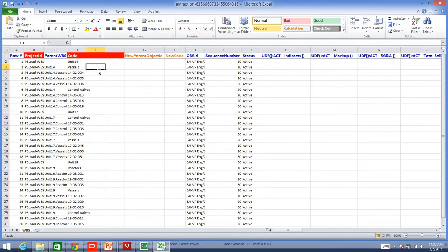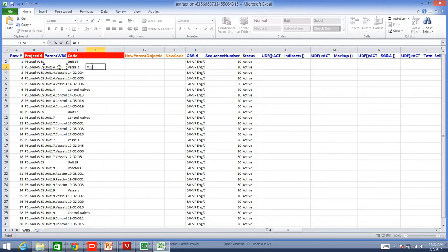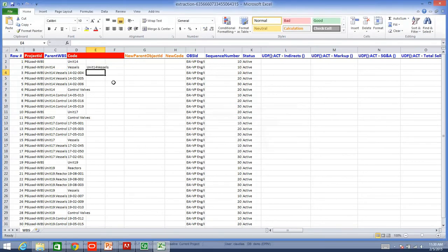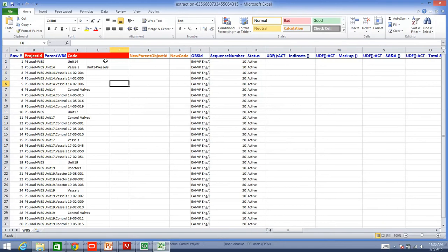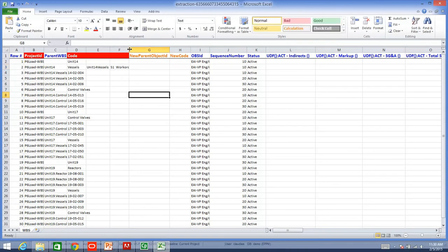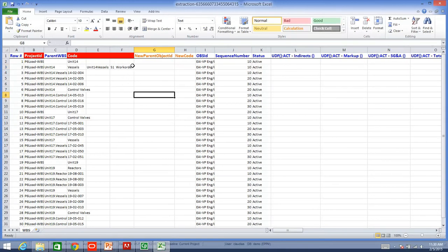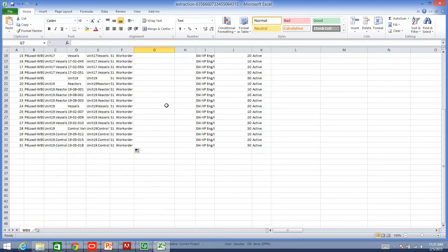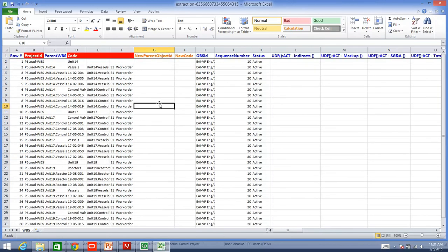I will say that my new parent WBS will be Unit 14, and the code, because I want to add my new code underneath. You see, this is a formula there. And then, I am going to say that I want to add a new work order, for example, S1 Work Order underneath. And I can easily fill this in. As you see, it is just no matter of time.